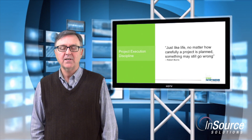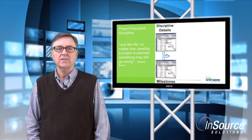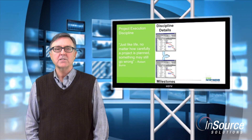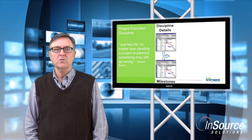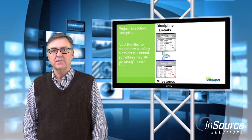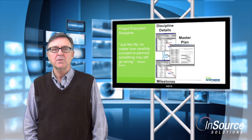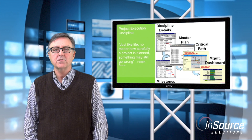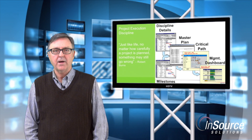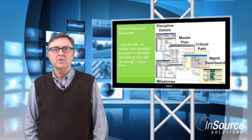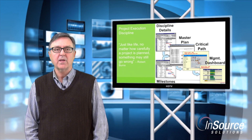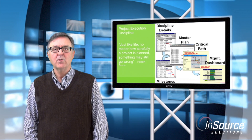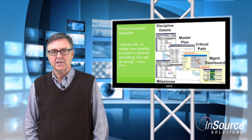This requires project execution discipline. So here's how we set up for good execution. Most key milestones are identified very early in project planning. A detailed project plan by discipline — where discipline might be the organizations representing operations, engineering, IT, quality, etc. — is built around the milestones. This yields a master plan, which is used as the primary tool to communicate and measure progress. Often, larger projects will be reduced to summary views to highlight things like the critical path and to make it easier to report progress. Another summary view is a project dashboard, which would typically be used to communicate project status during a periodic meeting such as a weekly team meeting or a monthly management review meeting. The tools and methods are scaled appropriate to the scope and complexity of the project.